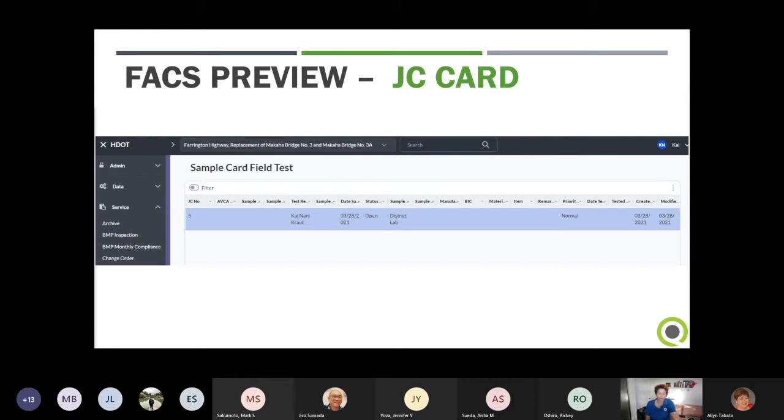For Nimitz, I just did an end of the month work report for the payment. So I didn't have the inspectors apply the quantities to a specific payment. I just went through at the end of the month. And when it matched up and we came to agreement with the contractor, then I did the work report and payment that way. And I think people are doing that as a workaround.